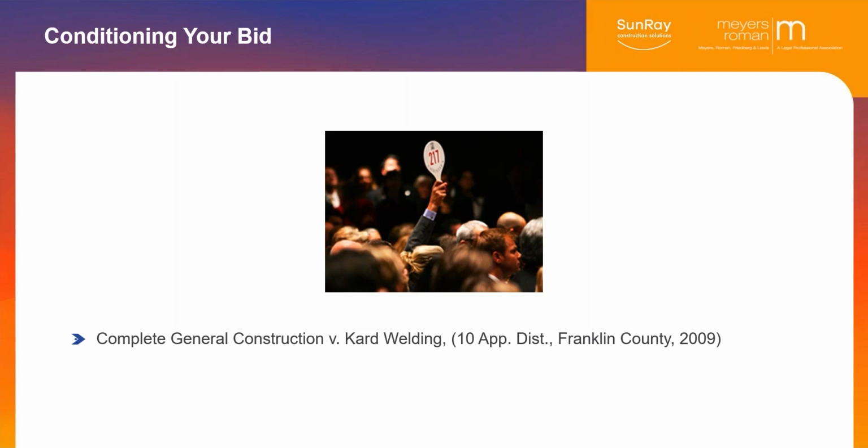In construction, because of this massive bidding process, so you're a supplier and you say you're going to supply windows and you're going to supply them to a subcontractor who is going to rely on you to produce exactly what you said in your bid. You can't go back later and say, oh, well, I want more money. So that works at the second tier level.